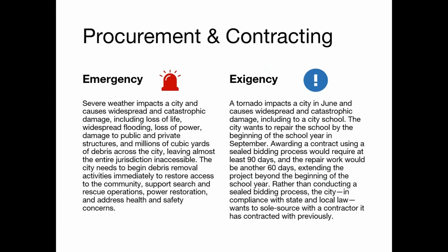In an emergency or exigent situation, FEMA may reimburse costs incurred under a contract procured through a non-competitive proposal, also known as sole source. Many disaster recovery projects funded under the PA program do not meet FEMA's definition of emergency or exigency. It is important to document your justification and describe the emergency or exigent circumstance in your procurement records.